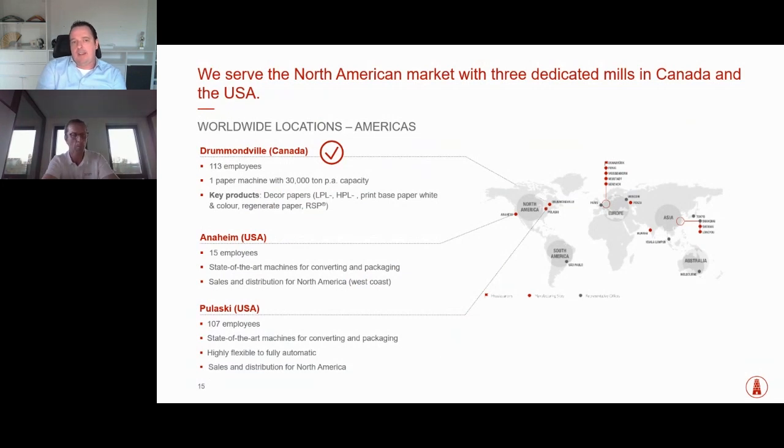The second learning: I mentioned that the organization in North America is very small. When we talk about Drummondville and the sales organization of Drummondville, we are talking about, I think, about 25 people in administration. Nevertheless, we said we need about 7 people out of them to be part of EASY North America and spend their major time in that project itself. And we were able in the end to do that. So our main players, 3 of them, were able to have about 70 to 80% of their time for the EASY North America project.